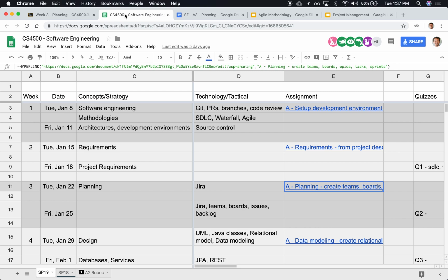We'll look at what happens in planning when starting a new sprint: looking at the backlog of tasks that we're going to be working on, creating new tasks, considering changes in the requirements, perhaps changing some, looking at the priorities of what is in the current backlog, and choosing what we are going to be doing this next sprint or week. Right?